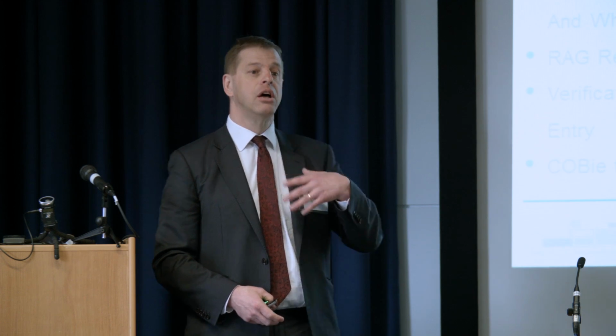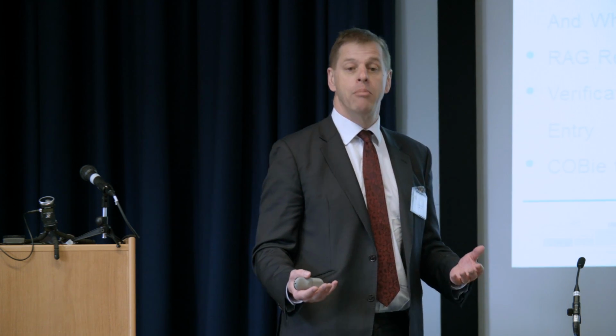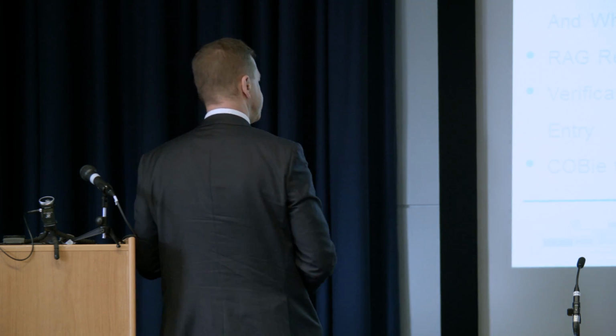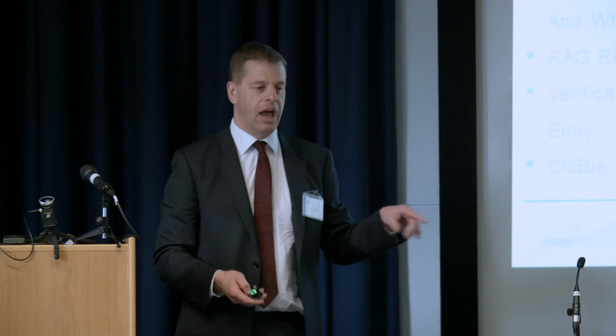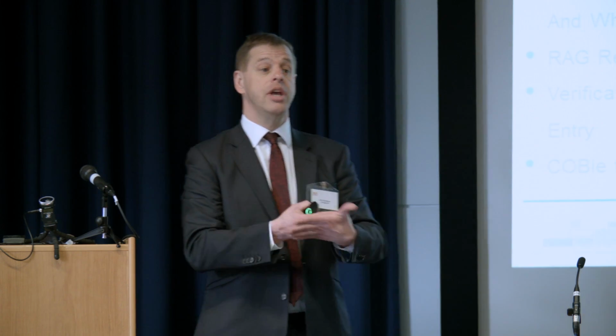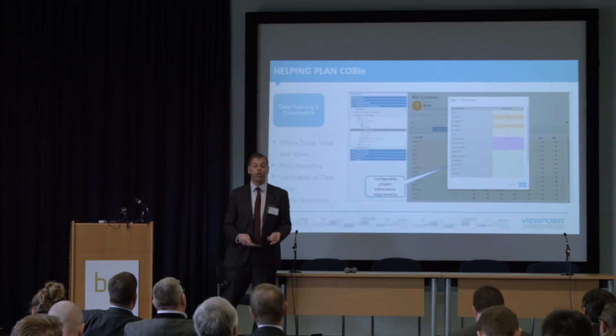You have to tell your supply chain and all the members of the design and construction team who's doing which bits of COBie, and then you have to reassemble those. You know, it's a huge task. So you need to be able to federate your COBie, and when you do that federation, you need something which tells you, you previously had a piece of information here, it's now a different piece of information in your latest upload, which one do you want? And you need to be able to record who's done that.